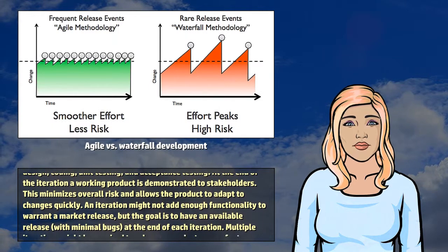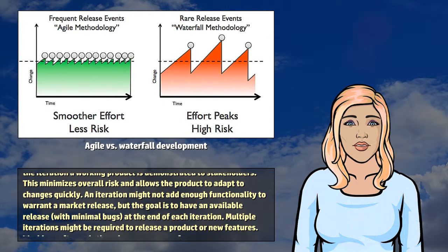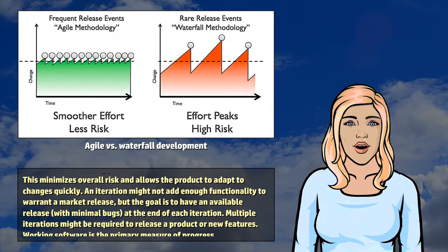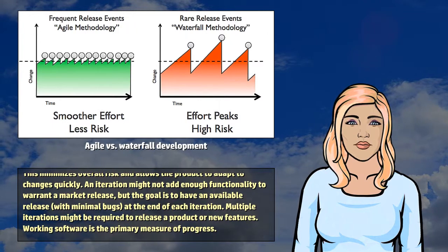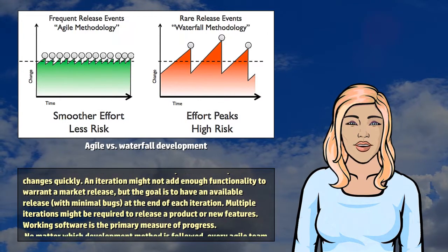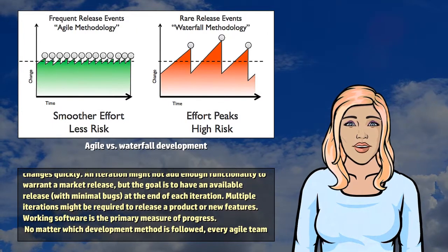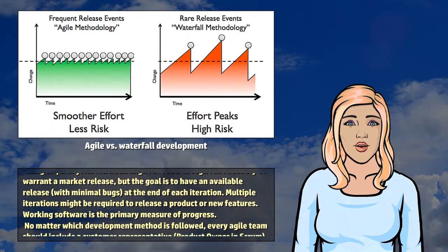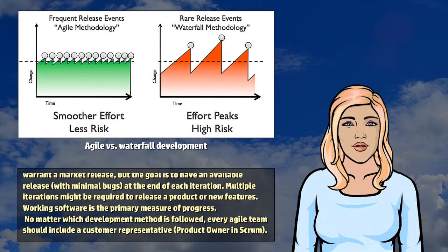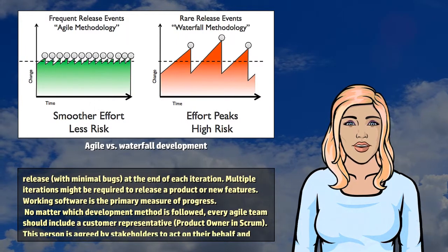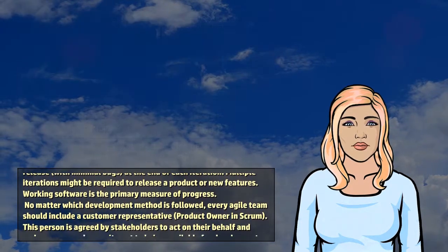This minimizes overall risk and allows the product to adapt to changes quickly. An iteration might not add enough functionality to warrant a market release, but the goal is to have an available release, with minimal bugs, at the end of each iteration. Multiple iterations might be required to release a product or new features. Working software is the primary measure of progress.